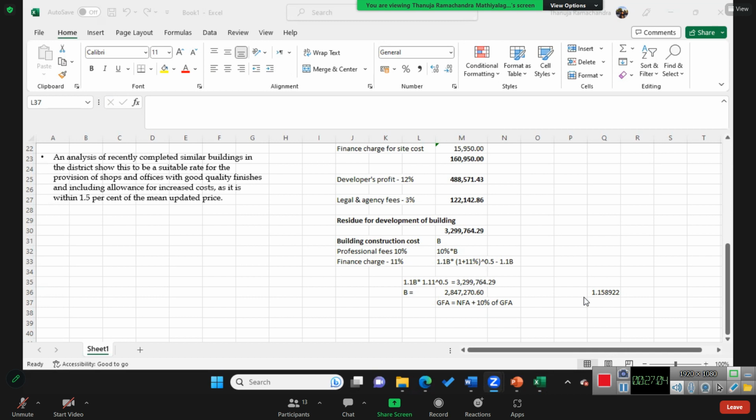So things like corridors and staircase areas. Those things are necessary to have circulation space in order to perform the function. But it's not considered in the functional area, right? For commercial spaces, when you get the rental, it's always for the net floor area. But when it comes to construction cost, it's always for the gross floor area, right? Okay, madam. Thank you.